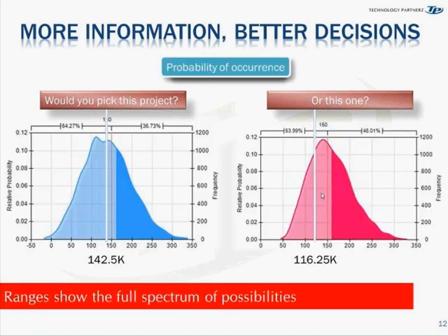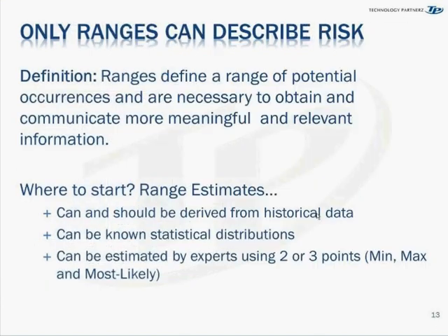If we look at this, you were absolutely right, because if you said that you had a business objective, and we picked 150 here, that you had to make 150, your hurdle rate, you would have a higher probability of making that number with 116 with the second project than you would with the first one. And that would never be known unless you ran this kind of analysis. So that's really what risk analysis does.